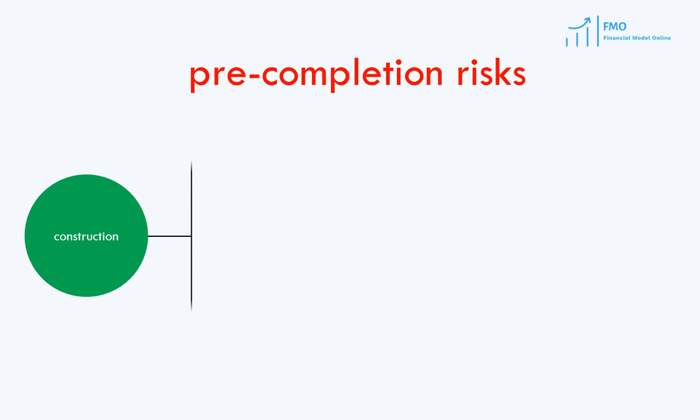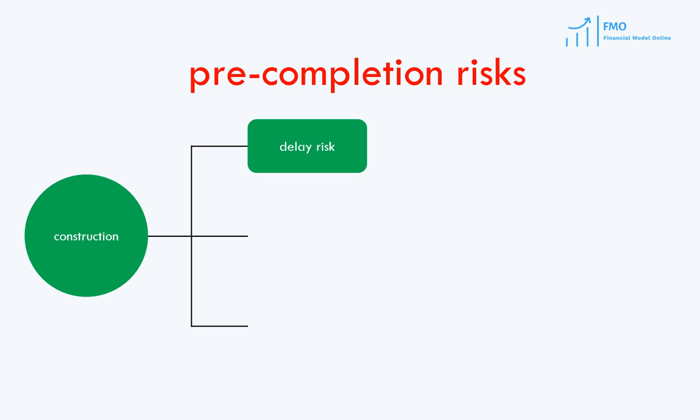When the project enters the construction stage, there are three major risks. First is the delay risk — will the project be built on time? If the project is delayed, the lenders will not be paid according to the agreed debt repayment schedule, the buyers will not receive the project's output as per the agreed schedule, the suppliers will not sell their product as per the agreed schedule, and the list of problems goes on. Project finance is a highly structured transaction where each step or misstep may generate a multi-million dollar liability as per the project agreements.